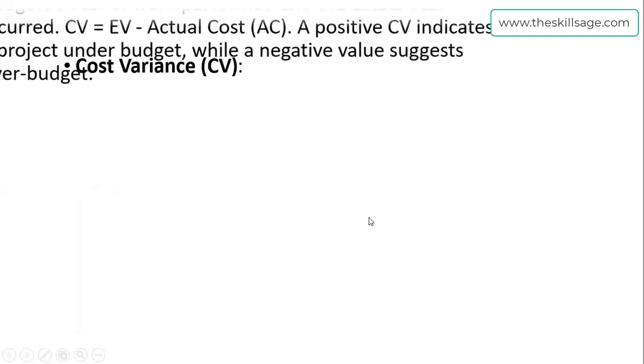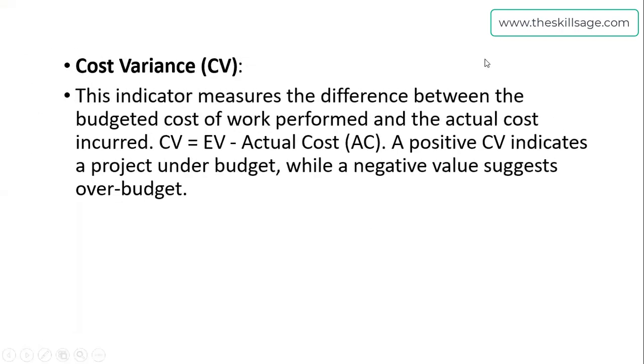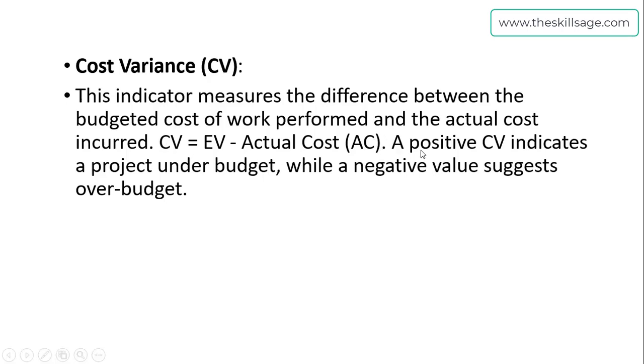The second important thing is cost variance. This measures the difference between the budgeted cost of work performed and the actual cost incurred. The formula is cost variance equals earned value minus actual cost. A positive cost variance indicates the project is under budget, while a negative value means we are over budget—we are spending more and our productivity and cost analysis were poor. If it is positive, it means we are going into benefit.